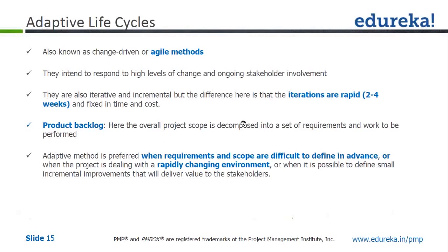The third one is adaptive life cycle, also known as change-driven or agile methods. They intend to respond to high levels of change and ongoing stakeholder involvement. In adaptive life cycle, the scope is not at all clear and there will be a high level of changes. Iterations are rapid — two to four weeks — and fixed in time and cost. The overall project scope is decomposed into a set of requirements and work to be performed, called the product backlog, which is updated with each iteration.